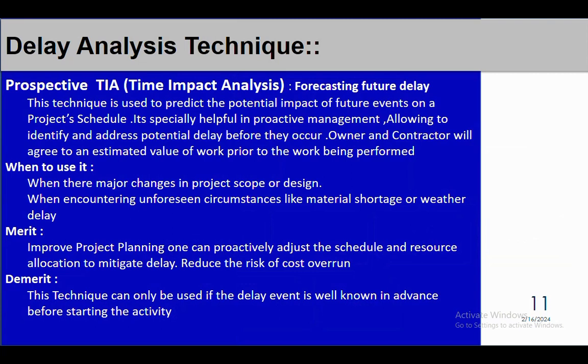Like for example, your project has been awarded, and before you start executing the job, the client comes with an additional scope of work or a major design change. So before actually starting the job itself, you know these are the delays, these are the additional scope of work, or there is an additional change in work that has been added to the contract, and accordingly you can plan your future activities to overcome such delays.